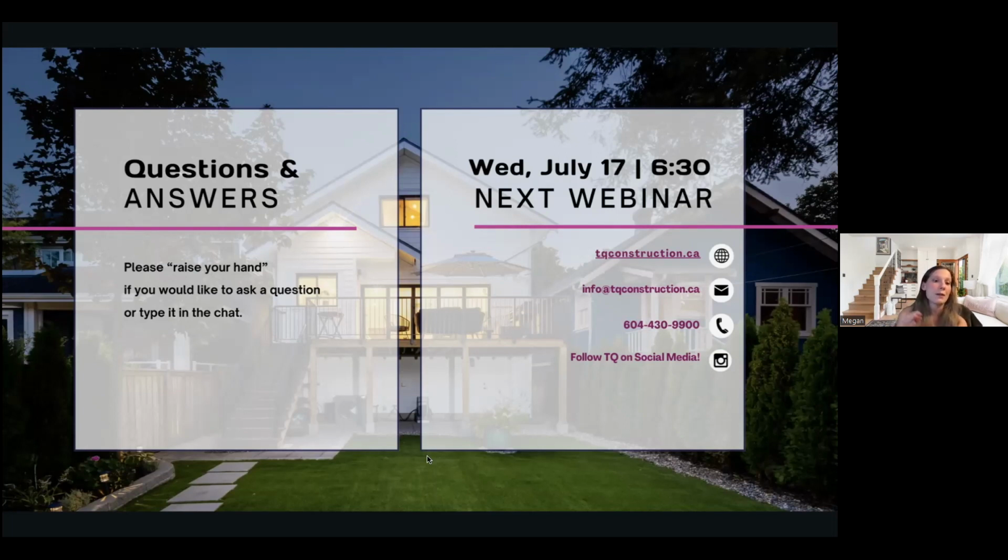And then when it comes time to reach out to a structural engineer, which is around the time that we've gotten to a floor plan that we are comfortable with and happy with, and that we definitely want to move forward with, at that point we reach out to the structural engineer, we send them the plans, and we ask them to look it over. And then they give us something back, and we go back and forth if necessary.